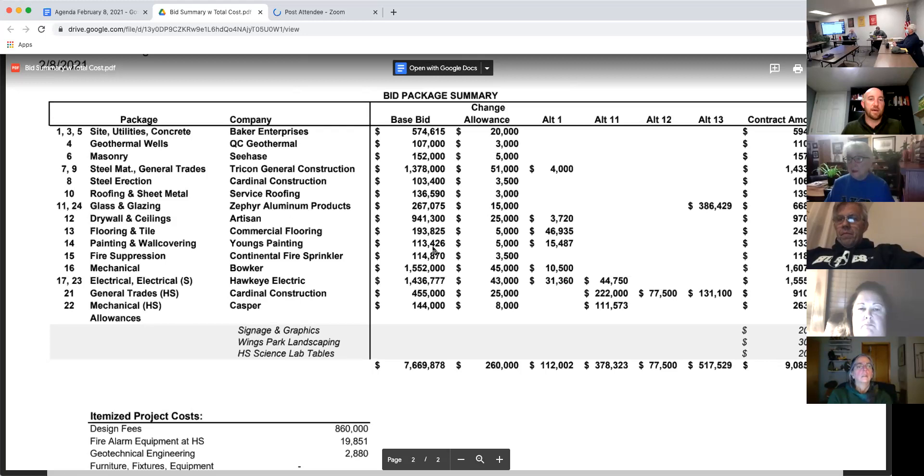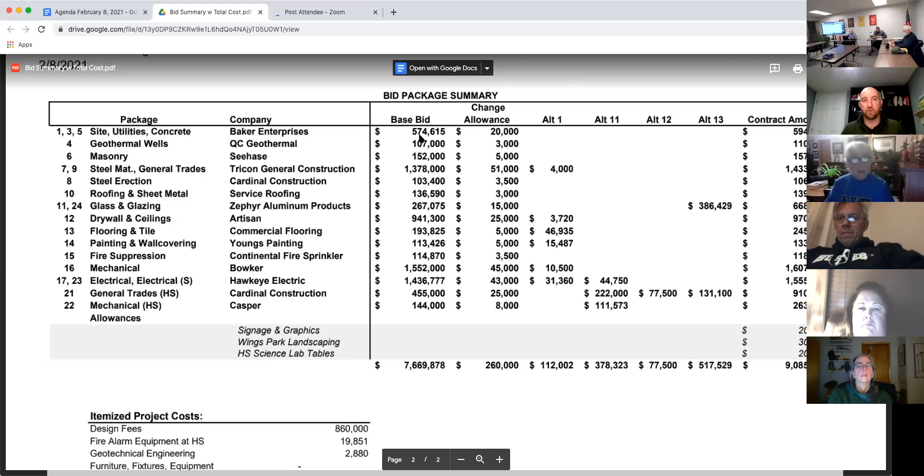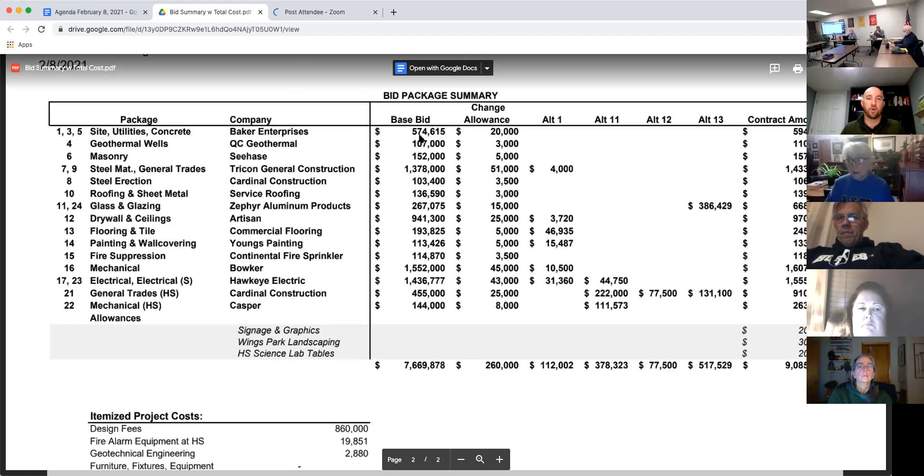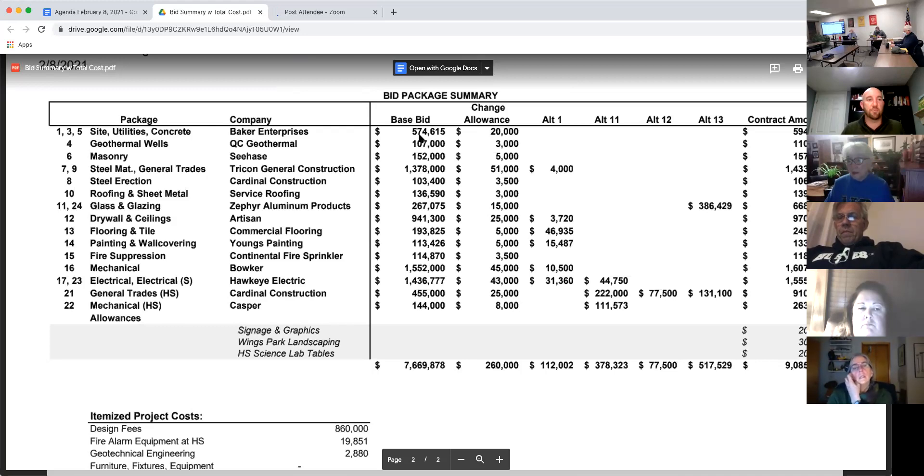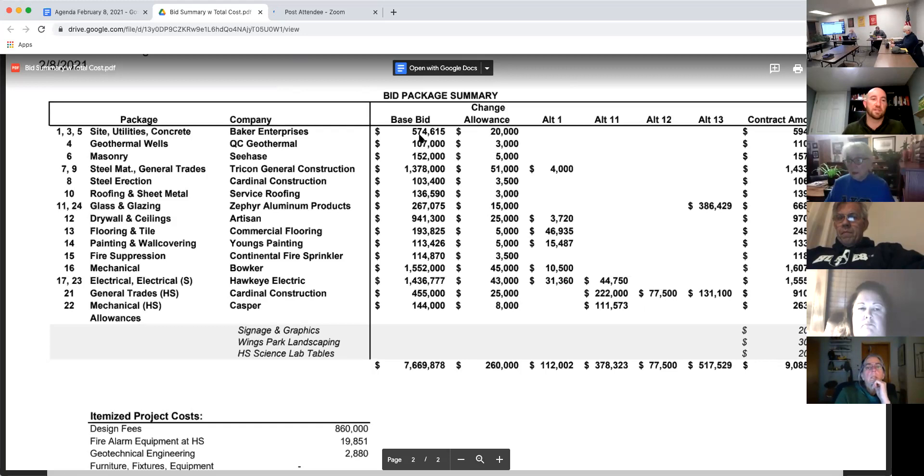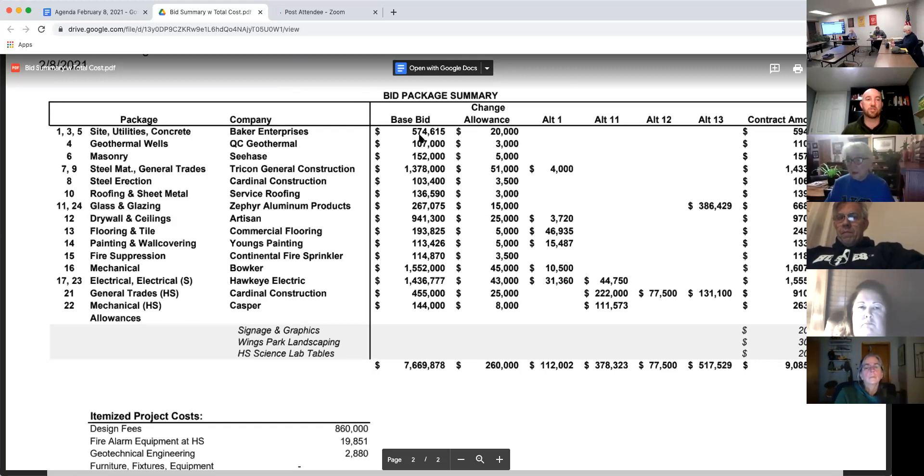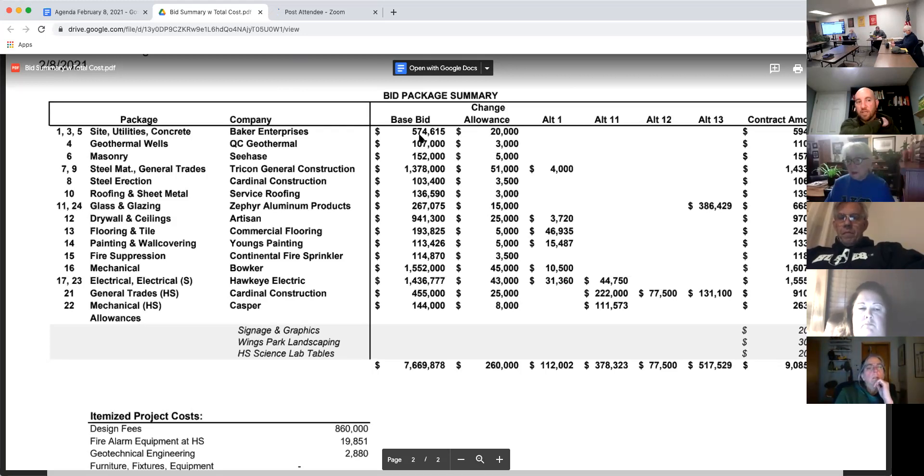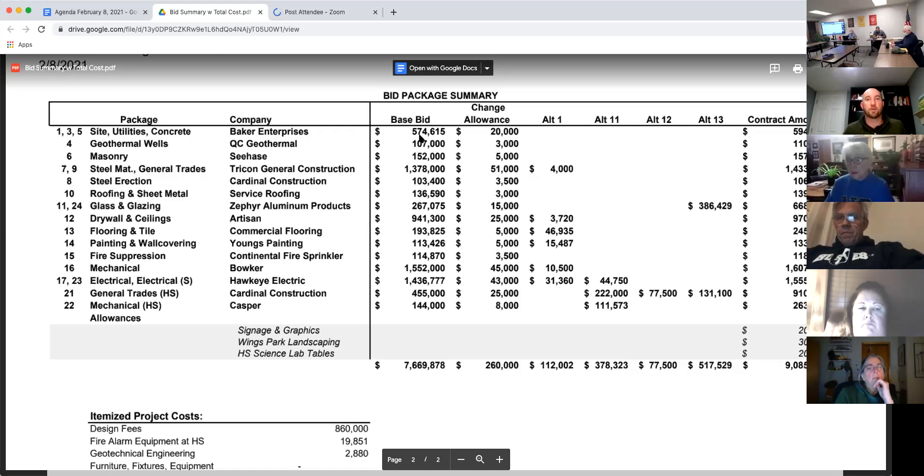The very top there, Baker Enterprises had bid package one, three, and five. Having the same contractor doing the dirt work, the utilities, and the concrete brings you some efficiency, takes a little bit of the gray area out of that scope. So I was really happy with that one. And then I thought we had a good mix as far as not really loading anyone up over both of the projects. They were kind of spread apart.